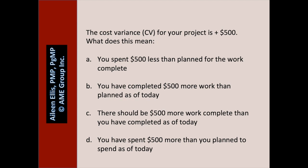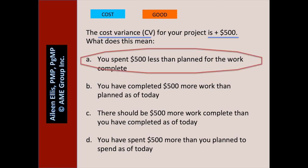The cost variance for your project is positive $500. What does this mean? Pause the video and answer the question. Is the question about cost or schedule? It's about cost. $500 positive — that's good. A: you spent $500 less than you planned for the work complete — that is what a cost variance of positive $500 means. B: you have completed $500 more work than planned as of today — B relates to schedule variance. C: there should be $500 more work complete than you have completed as of today — C relates to schedule variance. D: you have spent $500 more than you planned to spend as of today — D also relates to schedule variance. So A is correct.